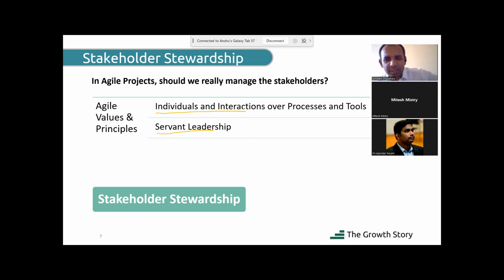Okay. Now, Mitesh, your experience. In your project, have you seen daily, weekly mailers to everybody? No, mails are not there. We are conducting this stand-up meeting, and then we have a weekly meeting with our region PM. Okay, that is a review meeting, like progress meeting. And monthly we are doing a meeting, like an engineering review meeting, in which the project sponsor and higher level management join, and for that meeting we are preparing the MOM.